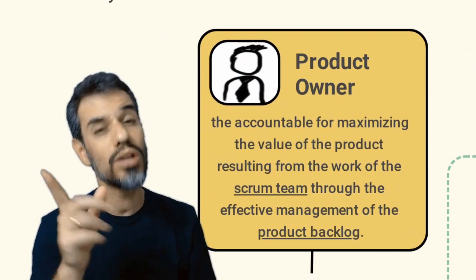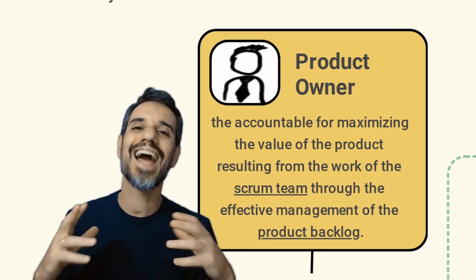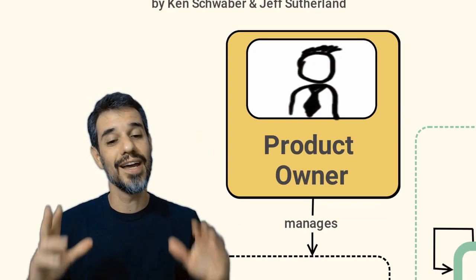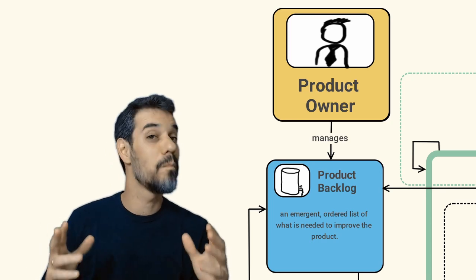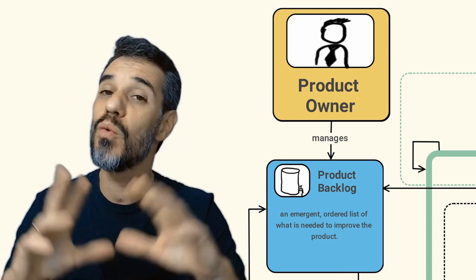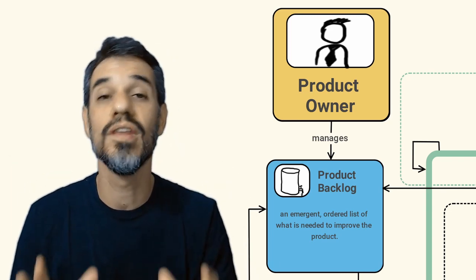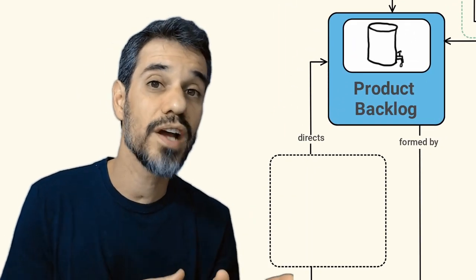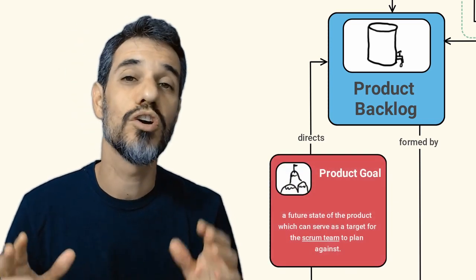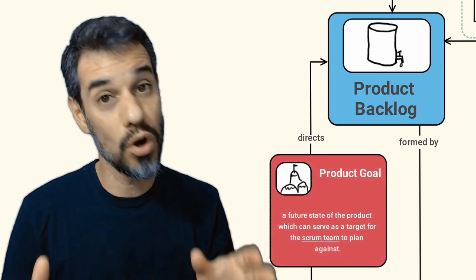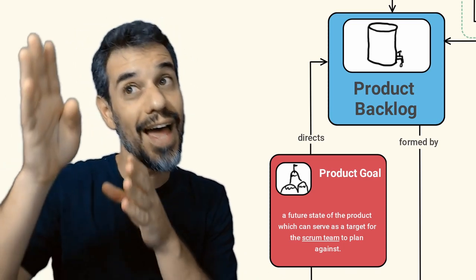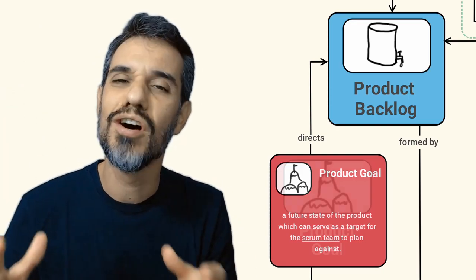The product owner, starting with him. He is the accountable for maximizing the value of the product. He is the one responsible for managing what we call the product backlog. This is the first artifact of Scrum. The product backlog maintains all the work and value that must be delivered by the product team. For each artifact there is a commitment related to it. And for the product backlog the commitment is the product goal. The product goal directs the product backlog saying to the team where this product should end, what's the final state for that product.